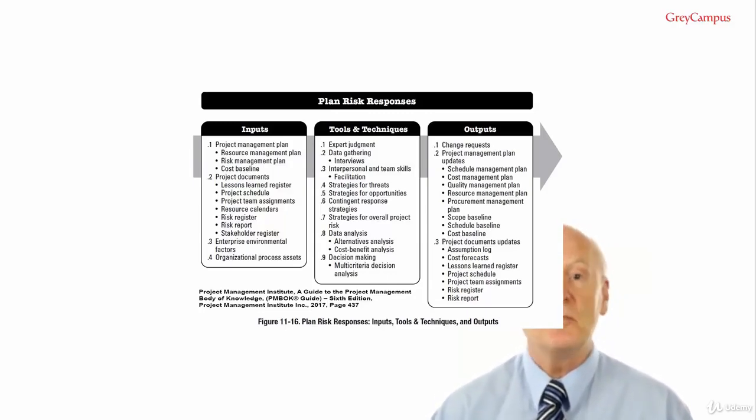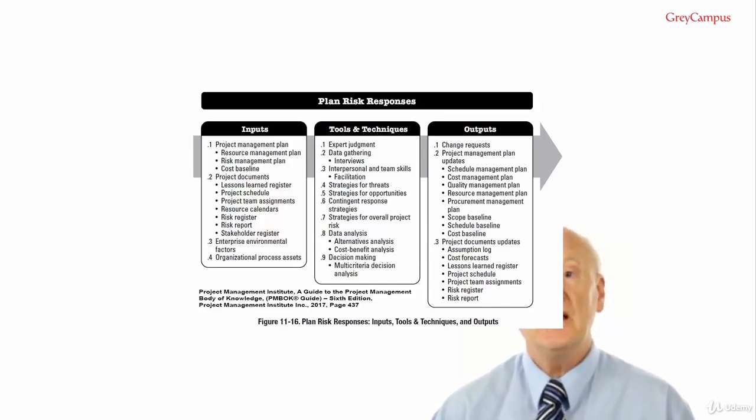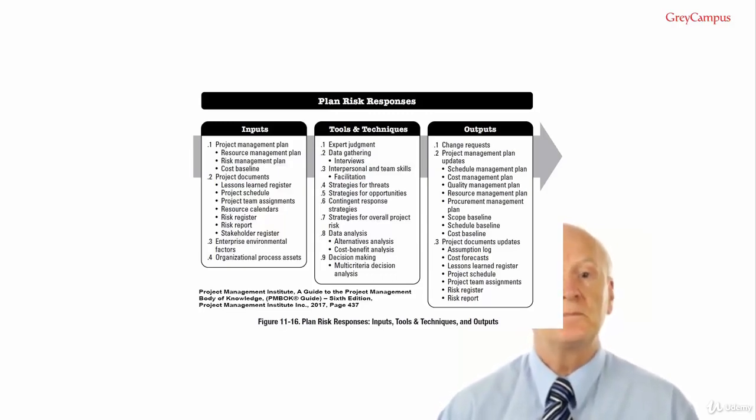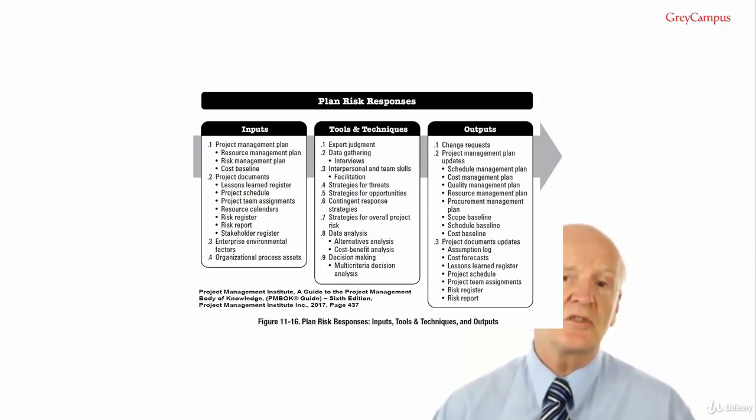Escalated opportunities are managed at a program level, portfolio level, or other relevant part of the organization, and not at the project level. The project manager determines who should be notified about the opportunity and communicates the details to that person or part of the organization.